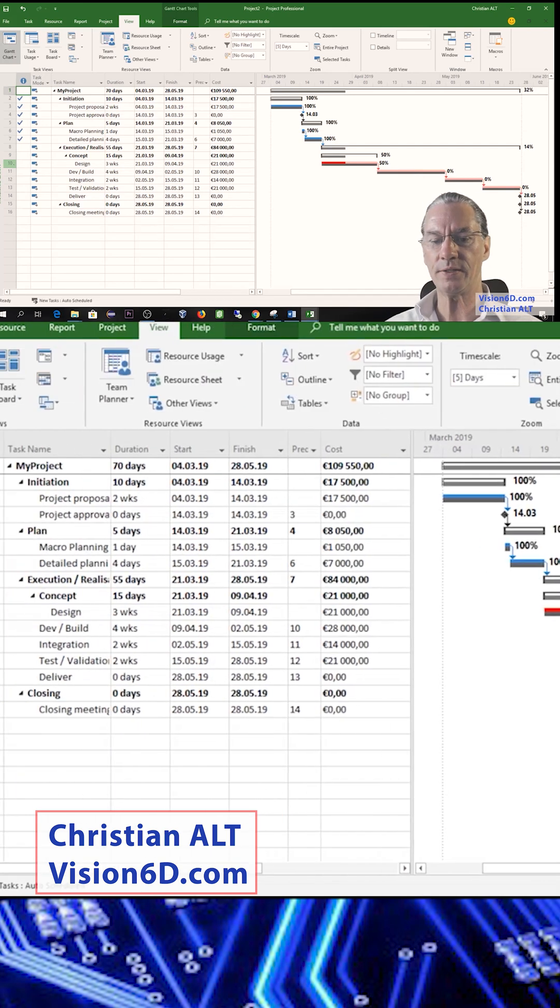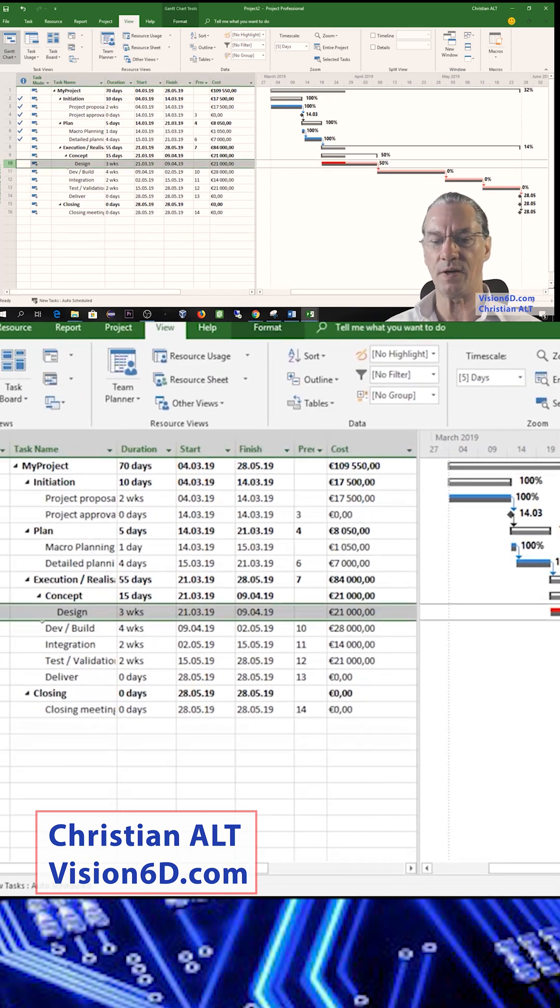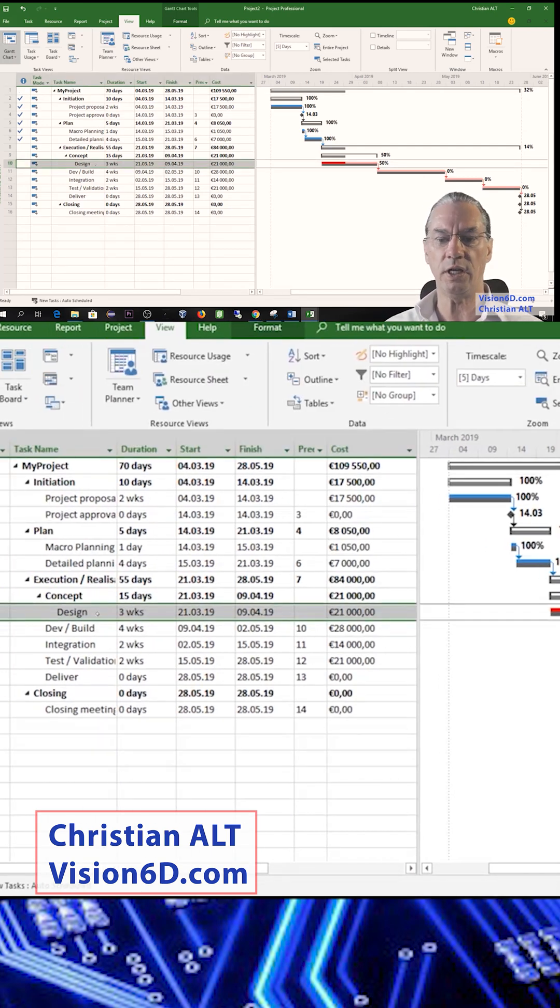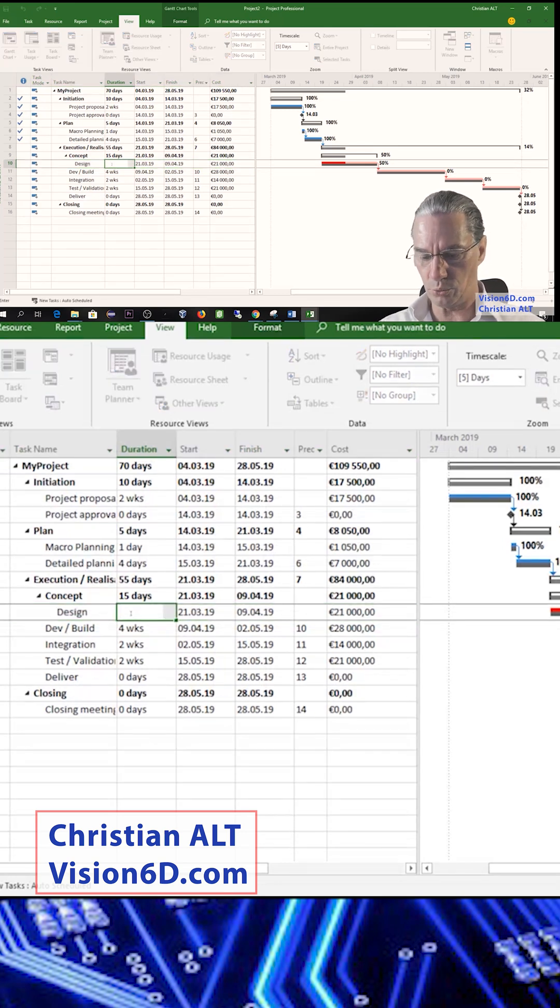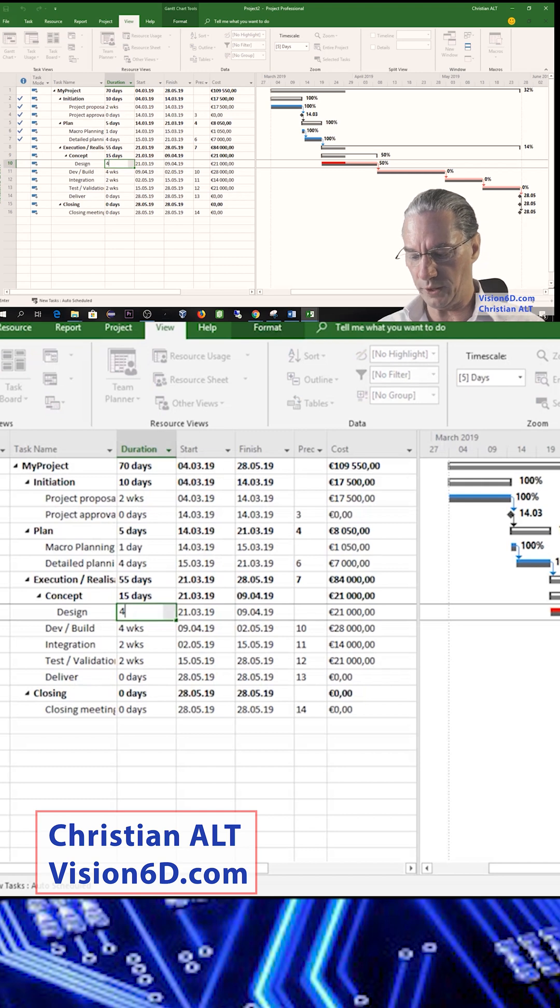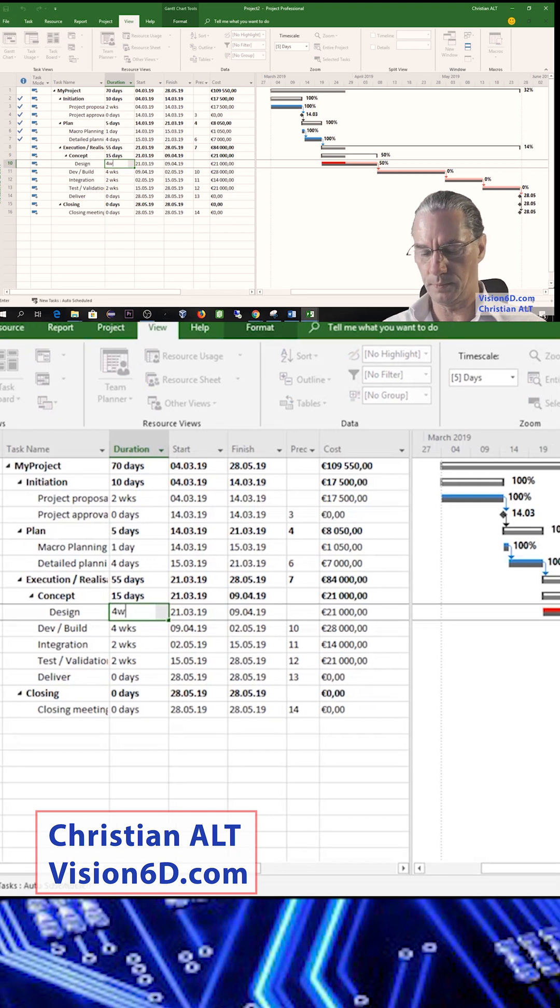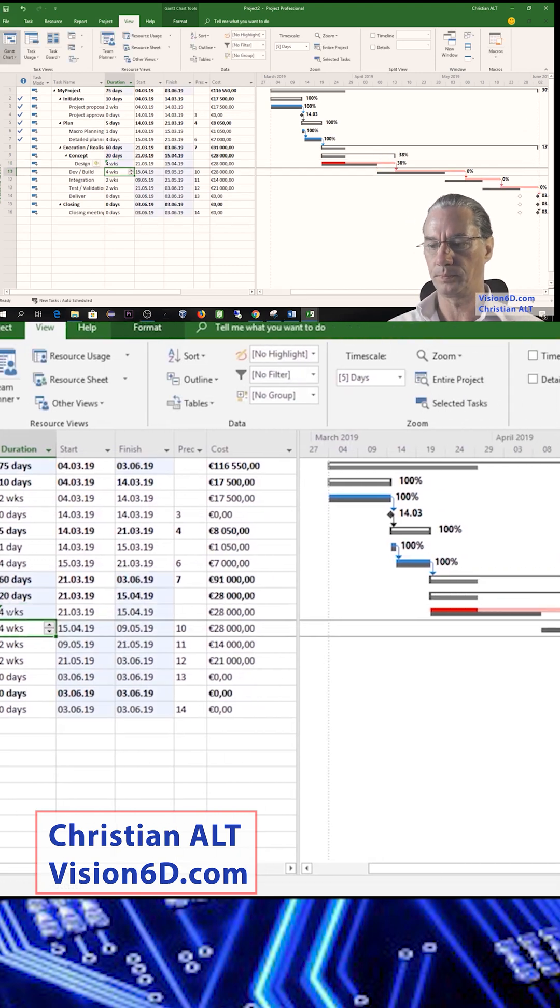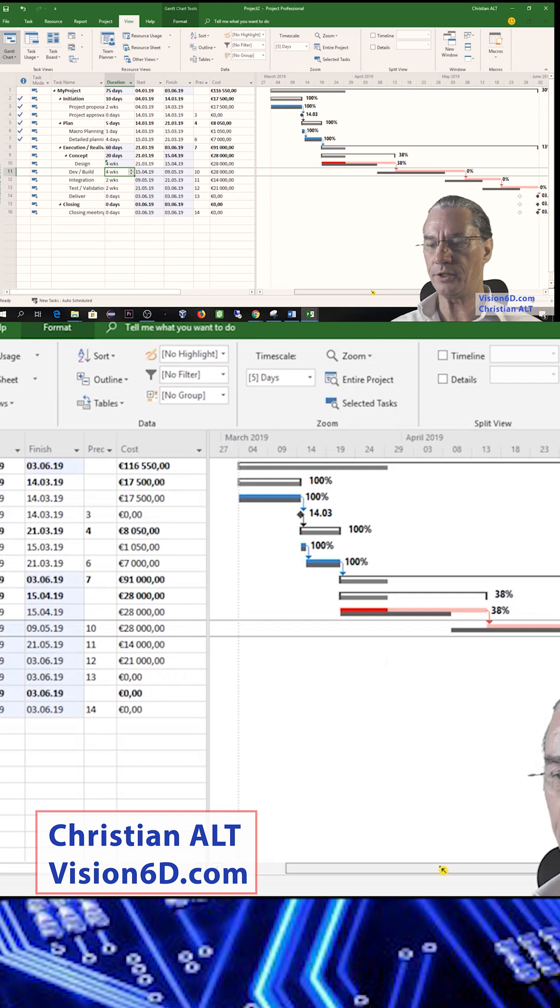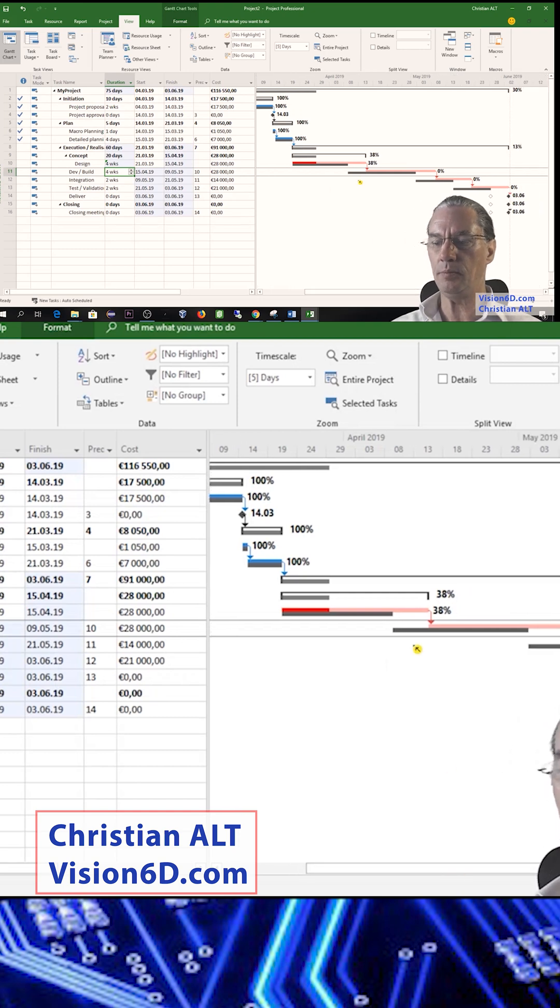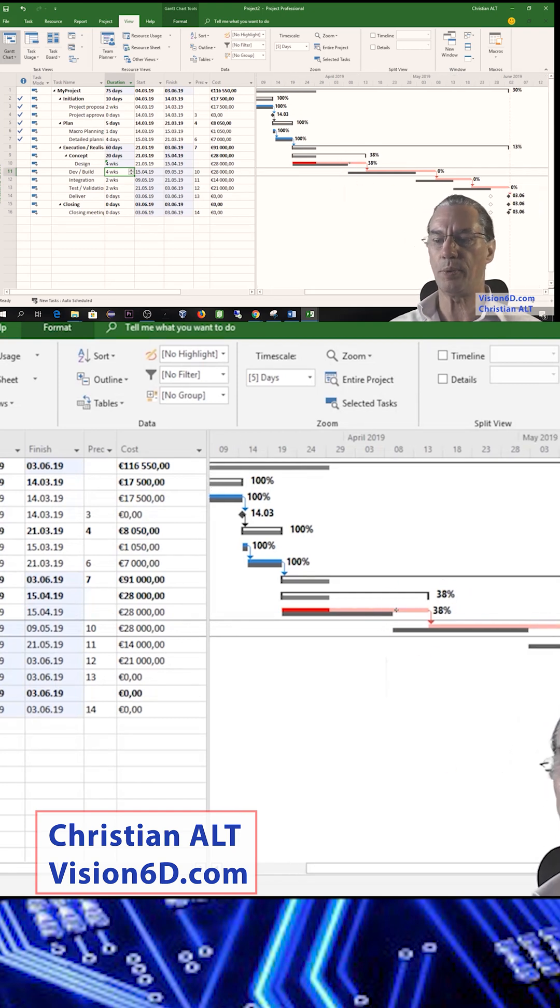So now let's go to the design and let's say that it took delays and instead of being three weeks, it will move up to four weeks. And we see here on the diagram that immediately it was postponed and delayed.